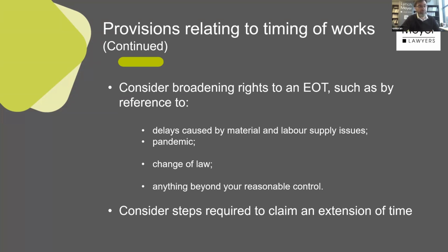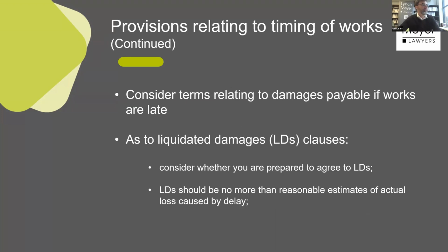But I've got, on the new Women's and Children's Hospital, contractors whose per day LD claims are many tens of thousands of dollars per day. So think about if they're delayed by 6 months, and they can't claim an extension of time, that's millions and millions of dollars. So these are issues that can be the difference between your business surviving and not surviving. So you need to treat them with a certain level of importance.